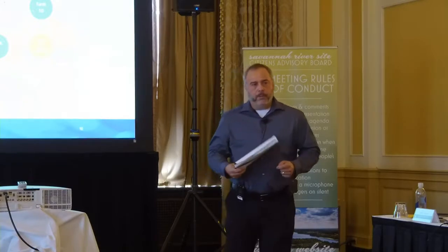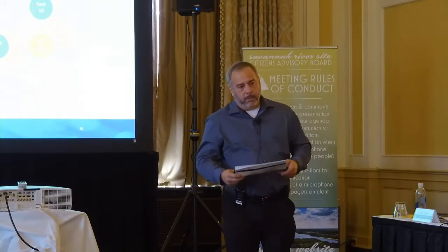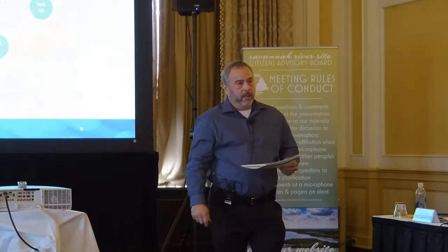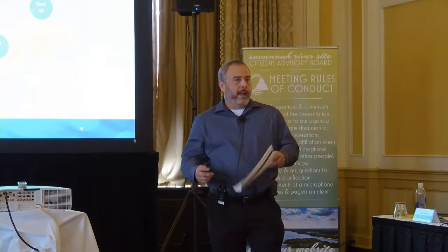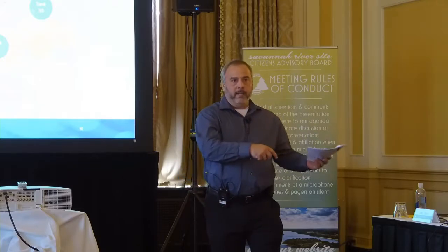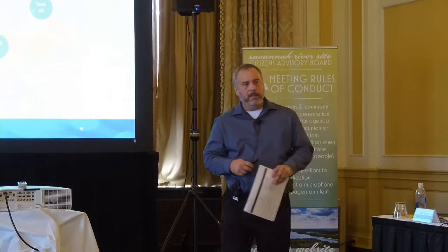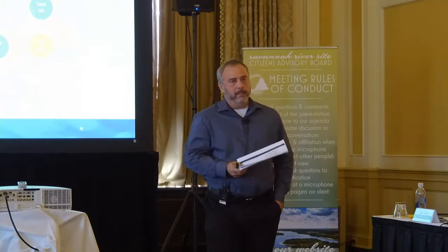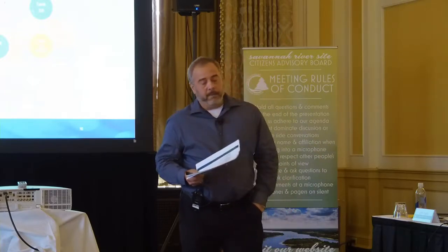We agreed to deliver an evaluation report on the technical and economic feasibility and efficiency of the Ticker and applying it to a second tank. That report is being finalized pretty much as we speak. The contractor is about to have the final version released through an external review process, and we'll be delivering it to the state by the end of this week.